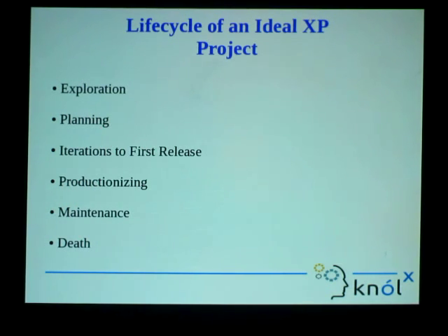They start planning for the 4 variables of XP, which are cost, time, scope, and... I'm missing one variable there. I think I need to check. Sorry? Risk. I don't know. Might be the risk, but yeah. So in the planning part, they take all these 4 variables into account and start evaluating them and making trade-offs. For example, they can put in a lot of money, but they don't have time, so they increase the cost and reduce the time. But sometimes they don't have that much money to develop their product. They want to reduce the risk, but they have a lot of time to develop the product. So they increase the time and reduce the cost. And so on go the other 2 variables.